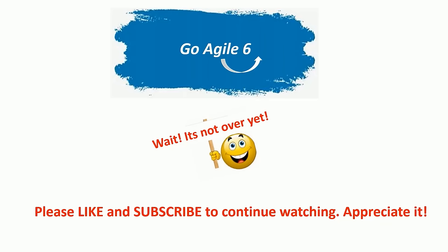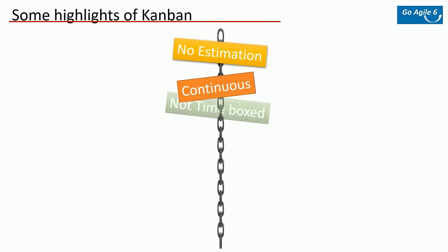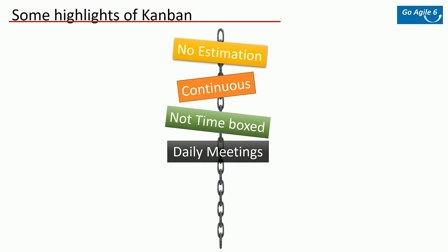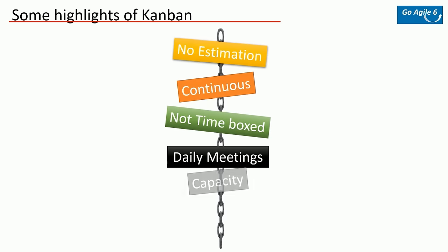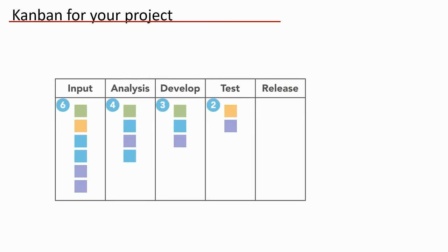Typically in Kanban there's no estimation — it is continuous or ongoing tasks with no time-boxed iterations. There are daily meetings but focused mainly on impediments. The focus is on delivery based on capacity rather than overloading developers. The issues, tickets, or tasks are put into an indefinite pipeline — in the agile world we call it backlog. There's a single indefinite backlog and developers pull tickets from it and process them.